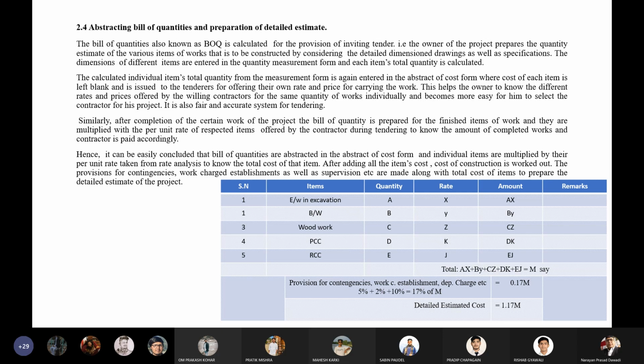The fourth payment can be made after completion of all the finishing works, including painting, etc. In this way, the contractor can be paid according to the contract document, the contract between the owner and the contractor, on how the payment is done.